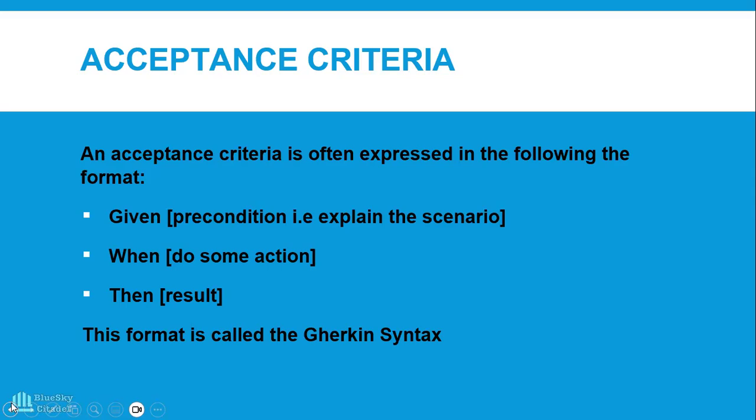As I want so that now. For your acceptance criteria, we have three statements. Given, when, then. Okay? Given is the precondition. That means it explains the scenario. When, it states the action that will be done. And the then, it shows the results.